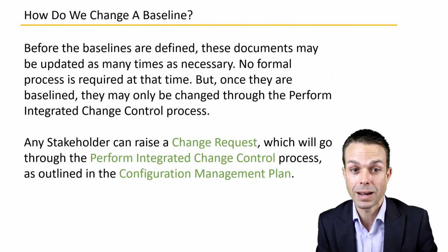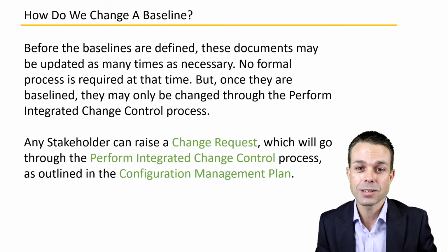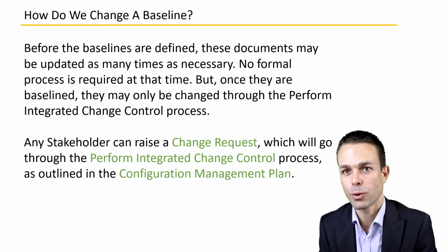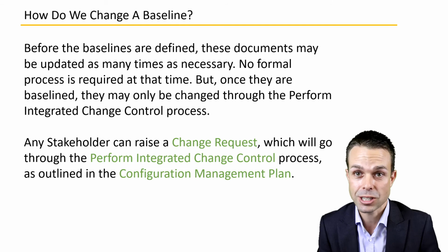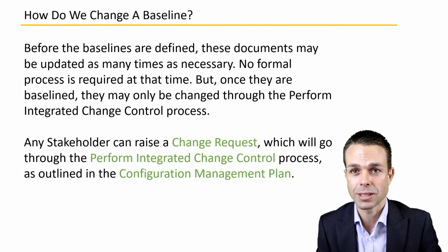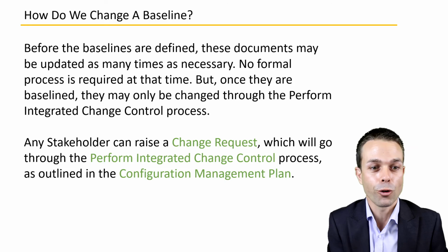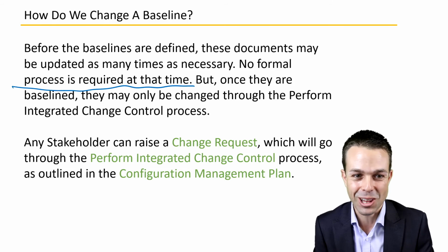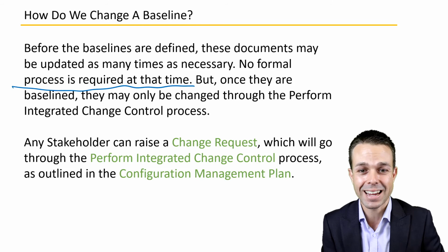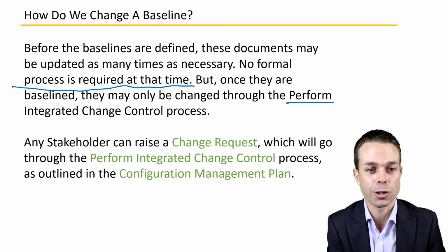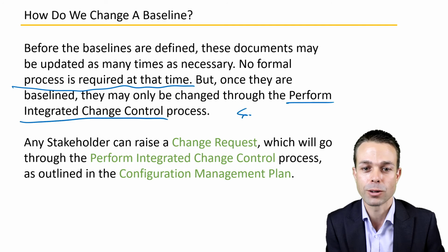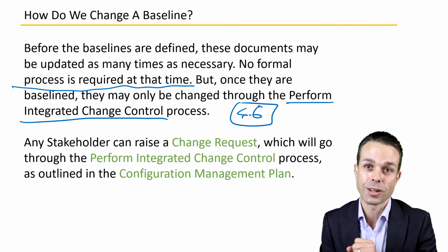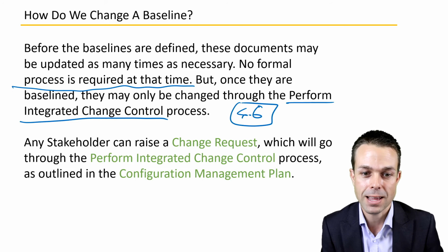So before a baseline is actually defined, all of these documents could be updated as many times as necessary, and you'll find that right at the beginning of your project during the project charter, and maybe just before you've locked in your project management plan. So no formal process is required at that time, but once that baseline is locked in, then they can only be changed through the Perform Integrated Change Control process, which you'll probably notice is around 4.6 in the PMBOK guide if you want to check that out. But any stakeholder can raise a change request. That's how this is done.